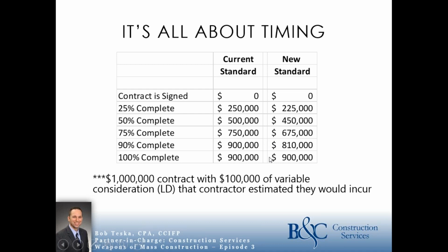However, at 100% complete, you end up at the same place, and you don't have this back-off of revenue that you've had in the past, where you didn't consider liquidated damages. So you start at the same place, and you end at the same place, but you've recognized revenue according to what you actually expect to receive.